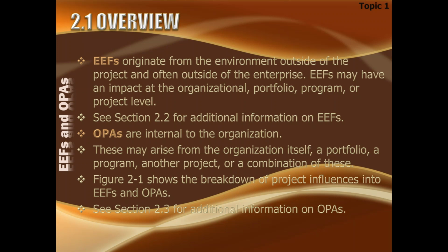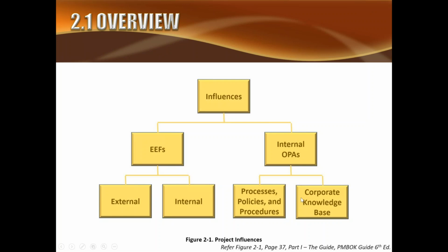But there are certain things which can be updated in enterprise environmental factors also. Like when you are dealing with the culture of the organization, when you are hiring people, you are doing things in your project, then they may leave some impact on enterprise environmental factors. Maybe if your culture is internally changed due to the functioning of this project, you are leaving some lessons learned into the enterprise environmental factors, and that impact is going to travel. So some things in enterprise environmental factors can also be updated, especially related to resources and human resources.